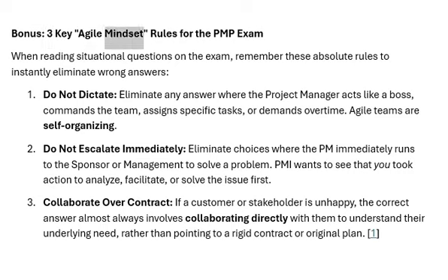Three key Agile mindset rules for the PMP exam. When reading situational questions on the exam, remember these absolute rules to instantly eliminate wrong answers. Do not dictate. Eliminate any answer where the project manager acts like a boss, commands the team, assigns specific tasks, or demands overtime. Agile teams are self-organizing.